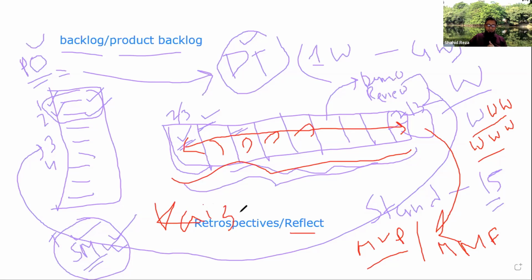Please also remember this term. You will see this term in Timebox, Kaizen. Kaizen means a small improvement. So in every retrospective, the Agile team try to find out some Kaizen, the improvement scope. And that Kaizen is implemented in the next iteration. So one of the beauty of Agile team is every iteration, they are actually trying to improve themselves, improve the team effort, the team performance. So that is another beauty of Agile team.